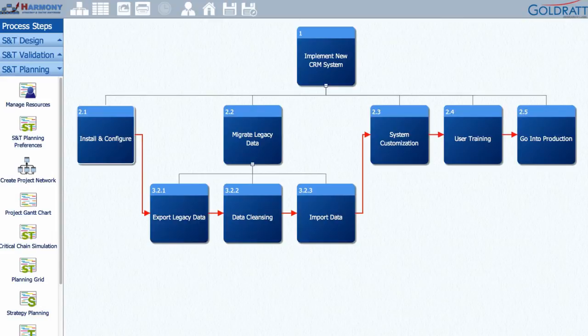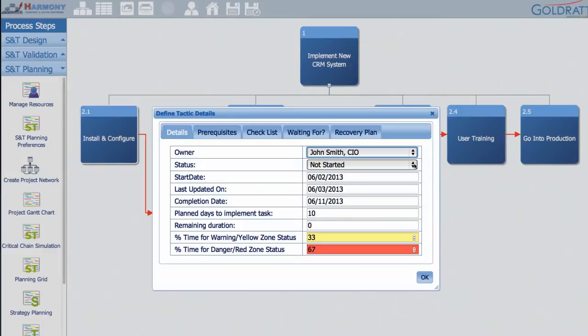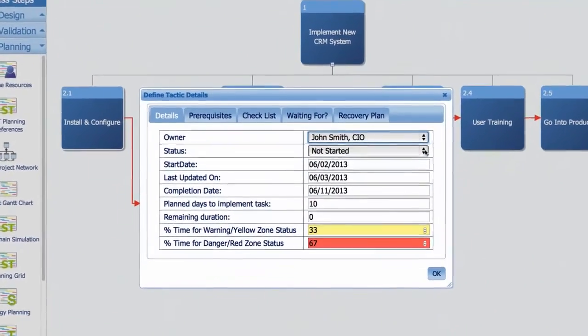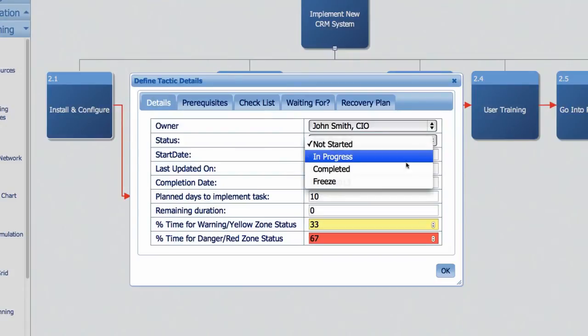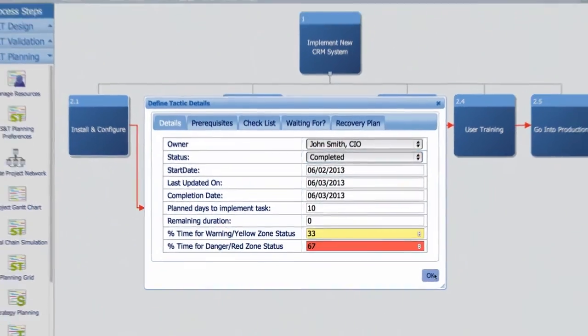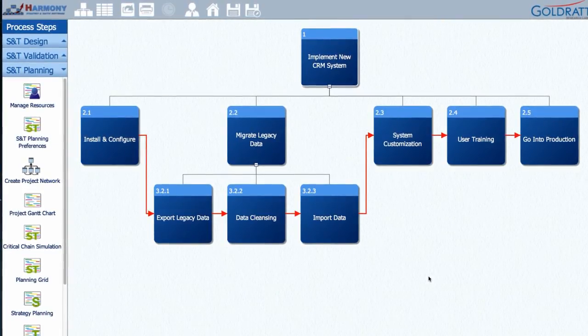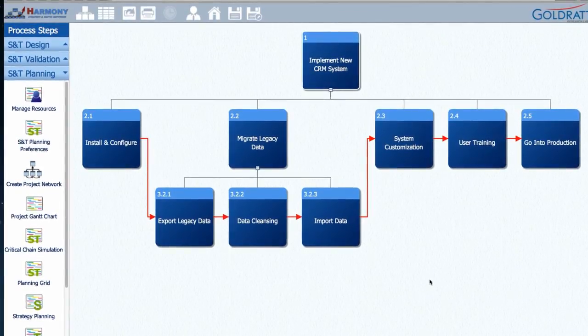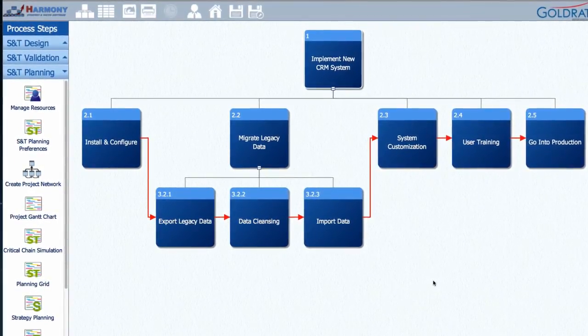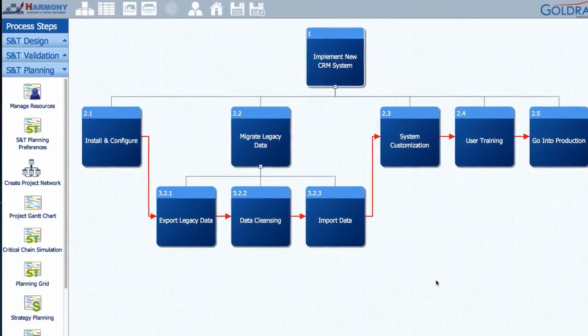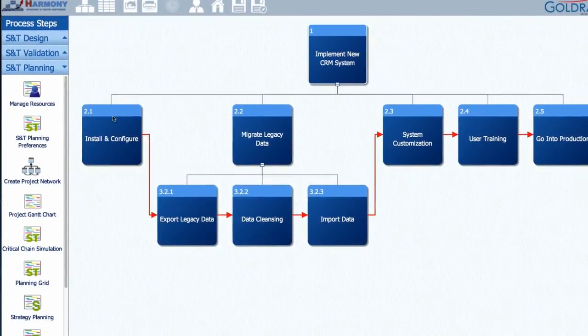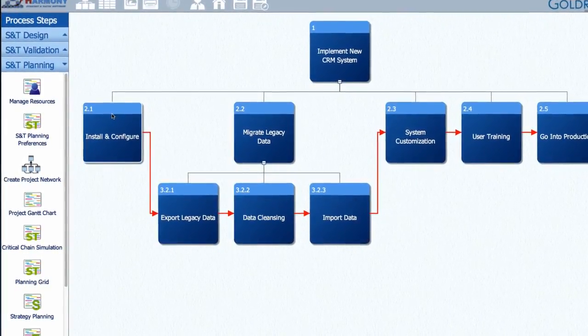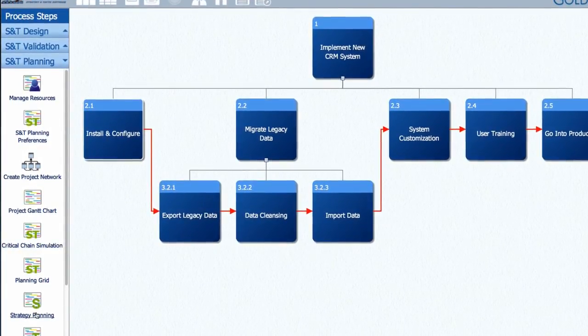Tactic managers can update the status of their tactics by clicking on the Tactic Planning icon. Here, they can change the status of a tactic from Not Started to In Progress and Complete. Since it's so easy to end up working on too many things at the same time, there is even a Freeze option to help you prevent such bad multitasking. If the tactic is delayed for some reason, tactic managers can also update what they are waiting for and what their recovery plan is so it is visible to all stakeholders.